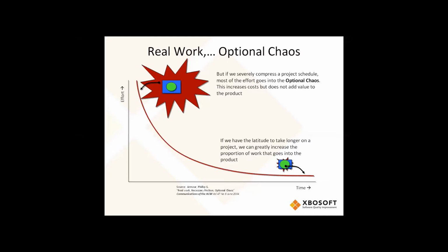And that's something to keep in mind. So if you're on a highly compressed project with a rapid ramp up of headcount, you should expect that you may require more QA and test professionals on the back end of that life cycle in order to clean out the code to be ready for delivery. And you should be aware that the ratio of your developers to testers might require more testers because of that schedule compression, as opposed to a project that might have a more relaxed schedule and a smaller team meeting a certain date.